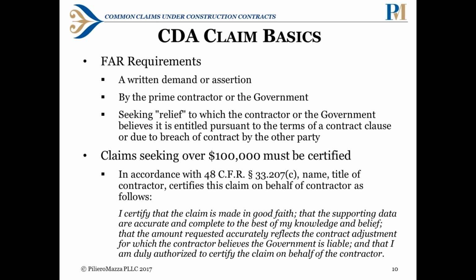Claims seeking over $100,000 must be certified, and here we've given you the magic words that the government is looking for. They want you to certify that the claim is being made in good faith, that the supporting data is accurate to the best of your knowledge and belief. And as I said, your numbers can change as the process moves forward, and you can revise your claim, but you should believe that the numbers you are submitting are accurate to the best of your knowledge.